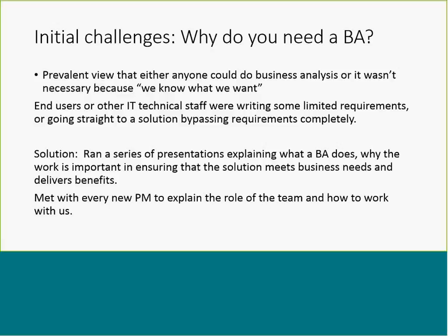Or they were going straight to a solution and bypassing requirements completely, and that, of course, always comes back to bite you later. So I gave a series of presentations explaining exactly what a business analyst does, and why the work of requirements management is so important in ensuring that the solution meets business needs and, at the end of the day, delivers benefits.